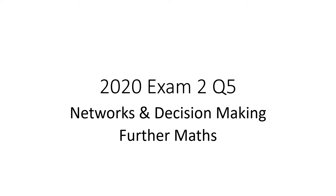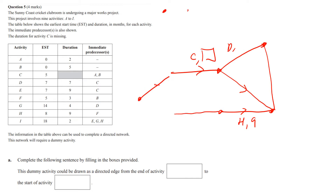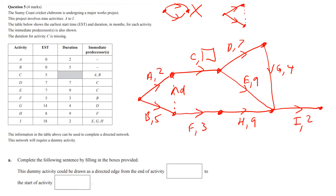2020 exam 2, question 5: Networks and Decision Making. They haven't given you the network to draw — you've got to draw it yourself. The important thing is this situation is not allowed, so you might have to insert a dummy. This is what they're talking about in part a — where does that dummy activity go? You could have one come up like this, one come down like this, and then insert a dummy, which could go either way.